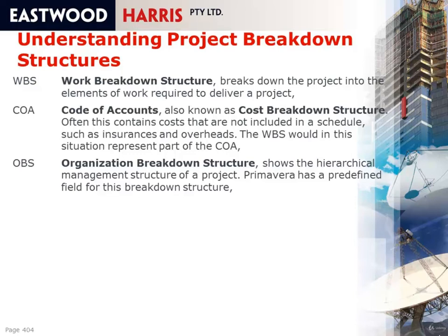Primavera has a predefined field for the organizational breakdown structure, but it's also used for the security element of the software. Therefore, I would recommend that if you wanted to see an organizational breakdown structure, I would probably not consider using the Primavera OBS function, but actually create an activity code so that it can be independent of the OBS that's used for security of the software.